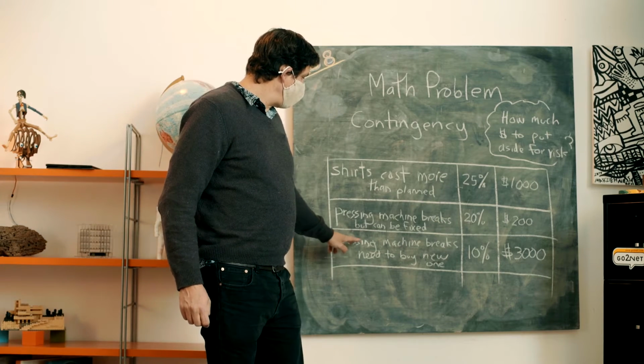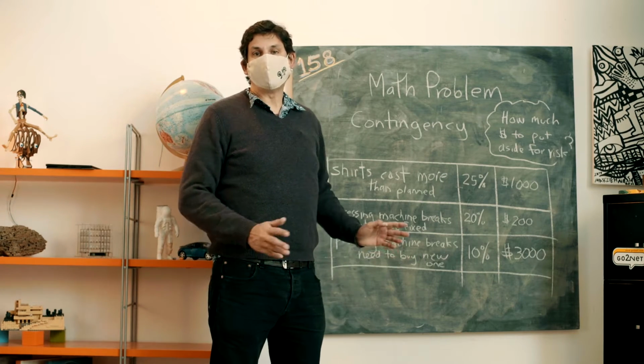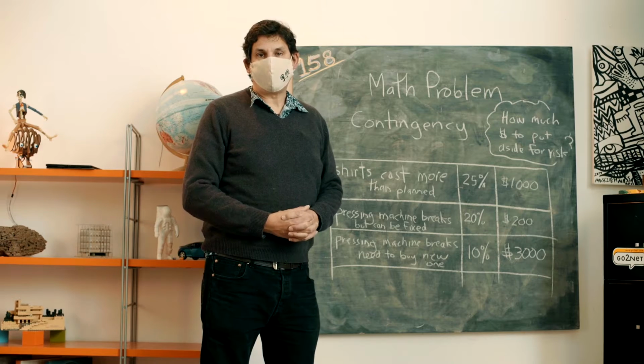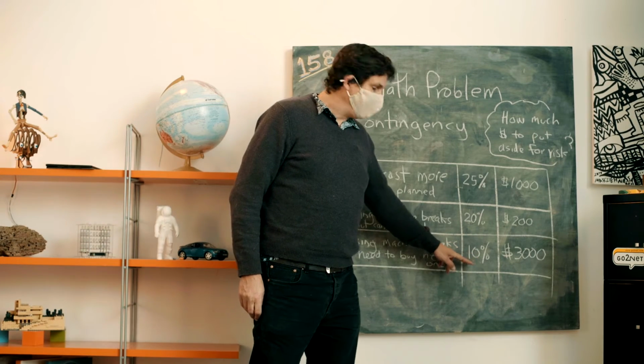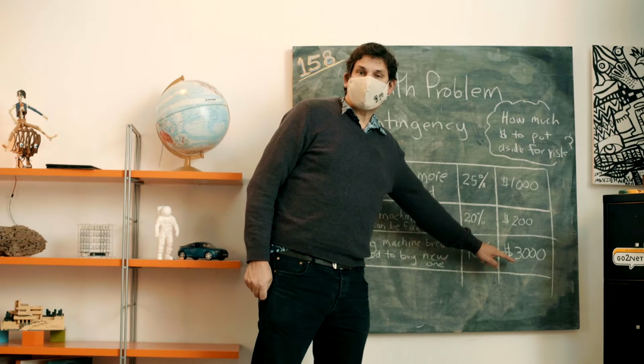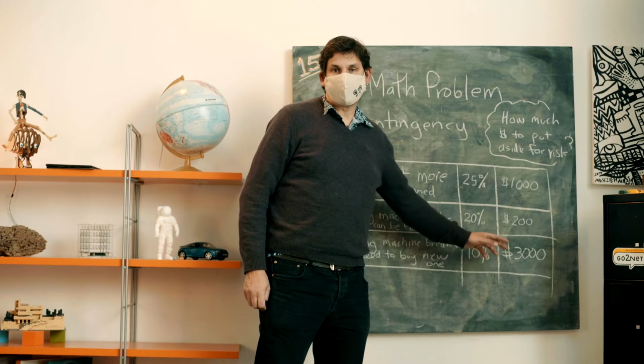Finally, what if the pressing machine breaks, but we need to buy an entirely new one? In other words, we can't just fix it. Well, there's a pretty low chance of that happening, maybe only a 10% chance. But if it does happen, it's a very expensive thing to deal with, about $3,000.